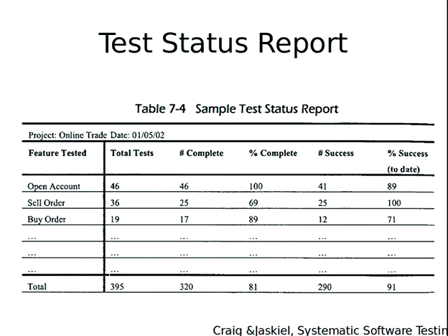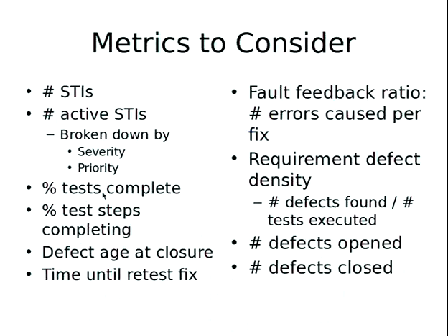Okay, let's talk about a test status report. So, there might be a feature here. There's a certain number of tests against it, what number are complete, and the number of those tests that are successful. So having some sort of indication of what you're testing, and then indications of what number of test steps have completed, or the percentage of tests that are complete that indicate success, can be quite valuable.